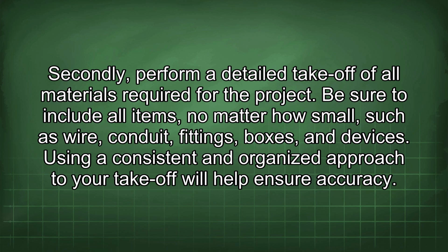Secondly, perform a detailed takeoff of all materials required for the project. Be sure to include all items, no matter how small, such as wire, conduit, fittings, boxes, and devices. Using a consistent and organized approach to your takeoff will help ensure accuracy.